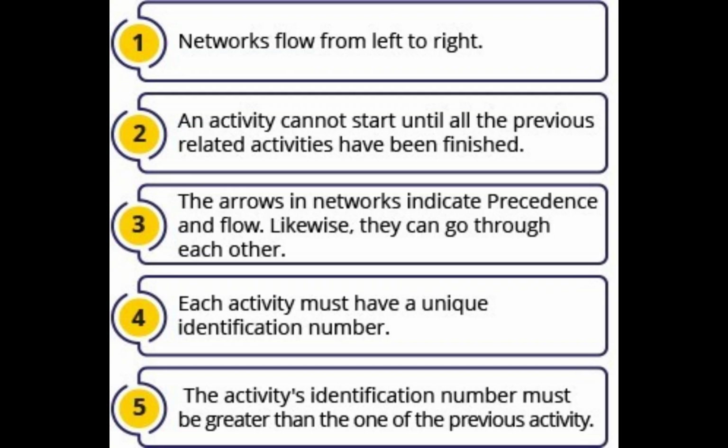When all the specific activities have been defined for each of the work packages, they must be included in a complete list of activities. The next step is to create a network diagram that shows the proper sequence and define dependency relations that indicate how to perform the activities in order to achieve the work scope and produce all the project's deliverables. Agido, 2012.